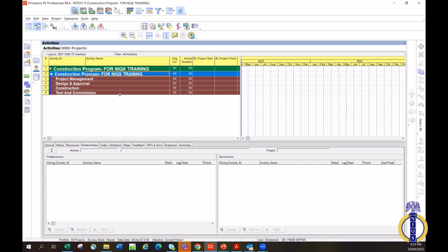So you see different characteristics of a milestone. I didn't want to do too much talking, so that's why I didn't bother about slides today. I just want us to work. Your milestone activity will not accept resources.